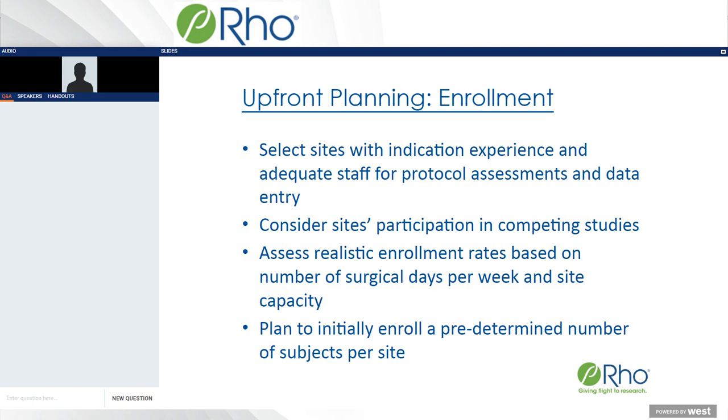Also, what is their capacity? So how many surgery days do they have a week? How many surgeries of your particular model can they perform in a day? How many beds do they have at their facility? All of these things will help you determine what the enrollment rate will be at that site for your study.